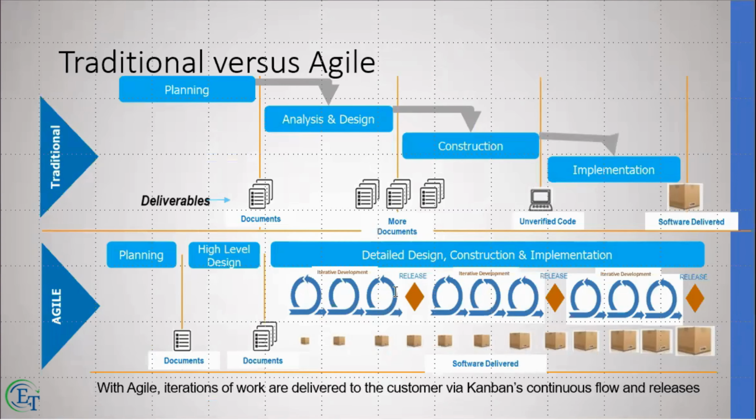So what's the primary difference between the traditional versus Agile method? You can see in the traditional SDLC process or waterfall process, you had to do planning upfront. You go through a stage gate. Out of the planning, whether it's high level, initiative requirements, etc. The result of the planning process would be documentation. So that's the deliverable, and that's what's approved out of this stage gate.